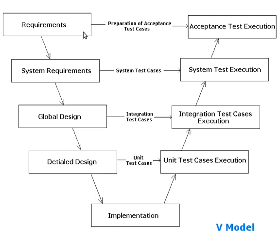For example, whenever requirement documents are written, we have test cases written for those requirement documents. The same applies for system requirements, then design, and up to implementation. The testing procedure here is developed early in the life cycle, before any coding is done. Each phase has its own testing implementation.